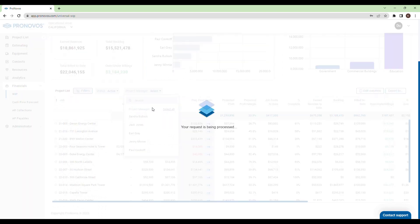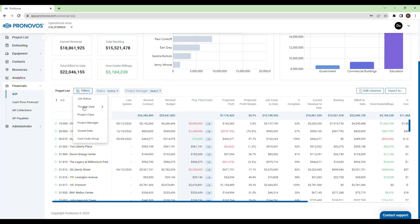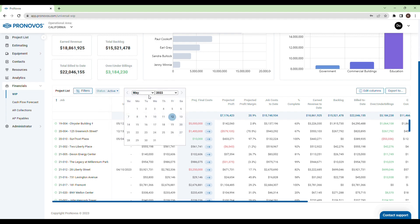It's easy to apply filters for job status, project class, closed date, and more. Most importantly, adjust the through date filter to see your project financials as of a certain date to ensure you are viewing the correct data when performing your month closeout.